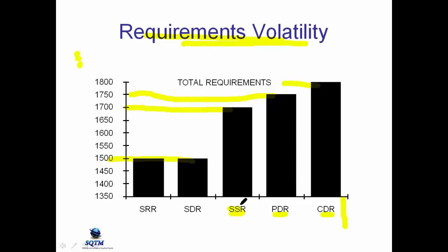And we could have seen that we're going to have potential problems as early as when we finished the software requirements. When we finished the software requirements and saw that our initial estimate was so off, we should have had an idea that this is going to have an impact on size, it's going to have an impact on code, it's going to have an impact on test, it's going to have an impact on documentation.